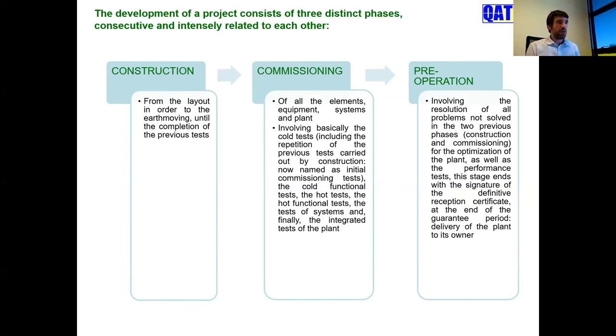the framework of every project, you have three separate stages, separate phases: construction, commissioning, and preparation. The construction starts from the earth moving, the assembling, the suppliers of every kind of packages, systems, and the previous test of the commissioning. Previous test means tightening and resistance measurement of the insulators.